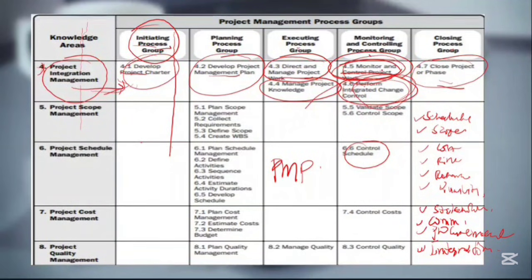And how we close a project, we need to understand it doesn't mean finish the last deliverable and walk away. You need to basically update all your records. So the party is done. We wouldn't just say the last activity is done. So the party closed. We need to take our time and learn our lessons. If you were to have another party next year, what can we do to improve? What can we do better? We need to know this. What went wrong? If we were to handle another similar project next year, how much are we looking at? Now we've done it, so we have an idea of how much it will cost. So we update all our records nicely. Lessons learned, we prepare a small handing over report, we disband the team, we check whether the objectives were achieved. You review all these, you learn your lessons, and you close it properly.